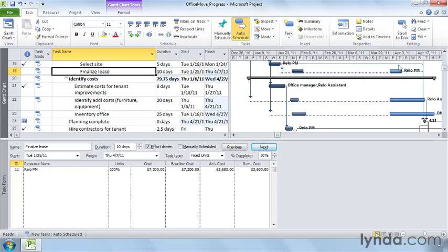on March 31st instead. And of course, any successors linked to these tasks move forward in time so that they still follow their predecessors. When you do this, look over your schedule carefully for edits you might have to make. For example, manually scheduled tasks or tasks with date constraints will need to be changed manually. And you may want to save a new baseline, which you learned about in an earlier movie.